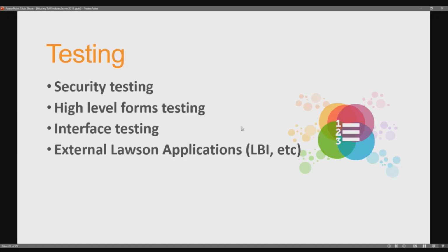Because if we are not upgrading applications, then we can do a straight product line copy. So literally nothing changes with the applications and everything should get copied over as is, and that should just work. But security is a little bit more piecemeal in the way you have to bring it over, so that is where you have an opportunity for things to go awry. That is something you definitely want to test thoroughly: the security.